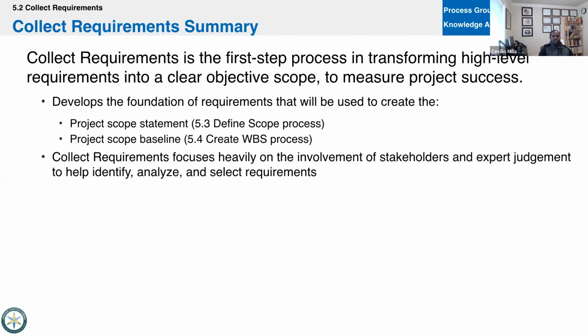Let's break it down into a BRD, right? So we heard, the project scope statement is going to come after this, and then the scope baseline will come after we create the scope. Everything that we create here is sort of like a chain. Create the scope: collect the requirements, define the scope, break the work down. That's sort of what we're doing here.